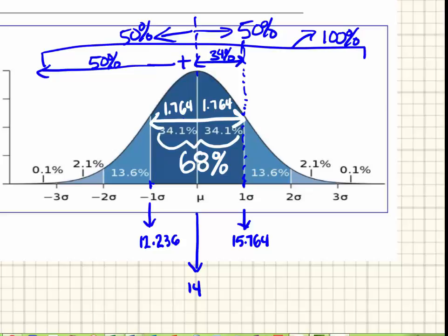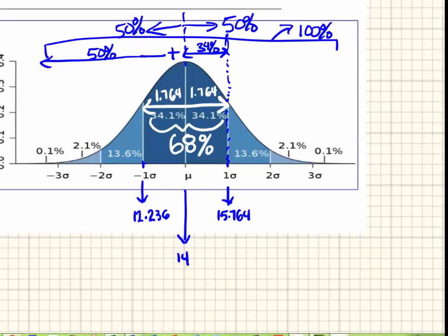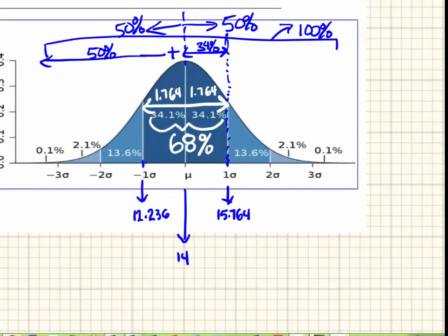Now, most people don't necessarily have the z-chart in their minds, so I'm going to show you how you can get that from looking at the z-chart as well. But let's go ahead and put the calculation here. We've got the z will equal the due date, or the date that they're giving you in the problem, minus the expected completion.